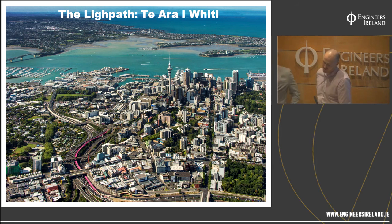The overall construction cost, the tender was, I think, 8.7 million New Zealand dollars, and then we had 2 million more for the artworks after that. So that was the investment that Auckland Council made during construction towards the end. And the majority of that went to the screens and to the Canada Street Bridge, like I said before.